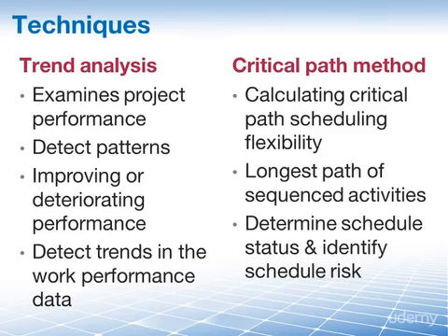Making comparisons of the project progress along the critical path can help you determine schedule status and also identify schedule risk, because if you have a delay on the critical path, your project is going to take longer.